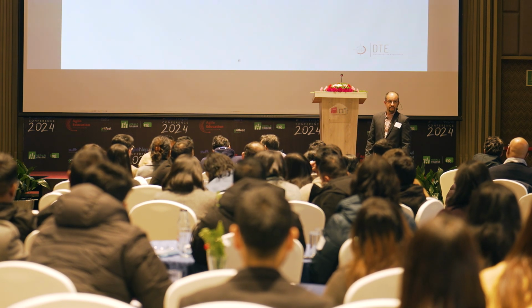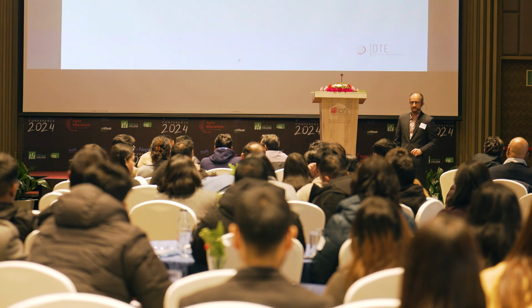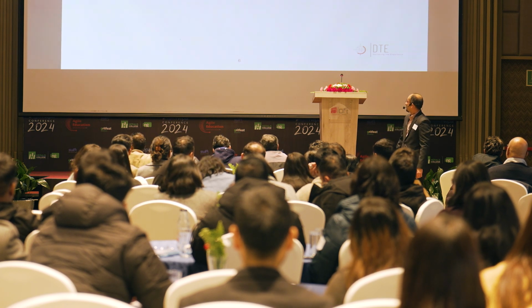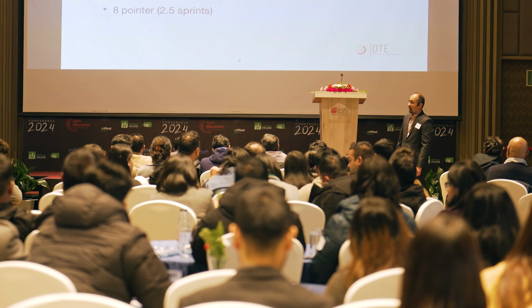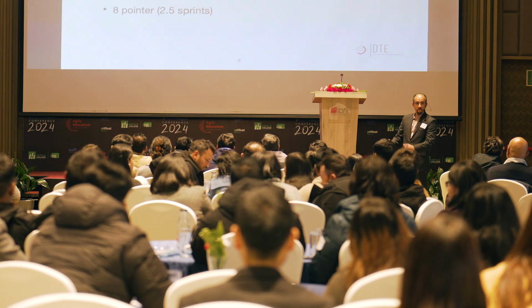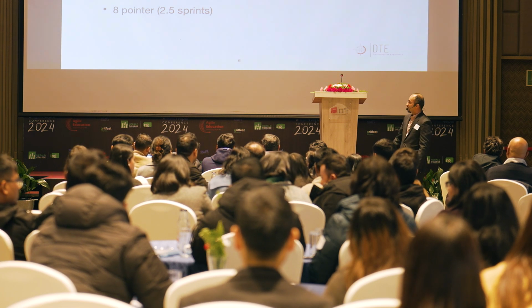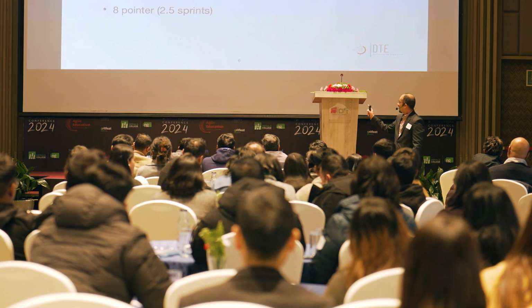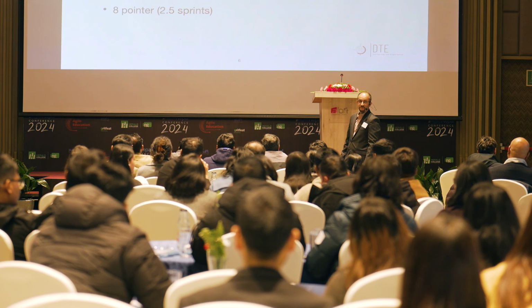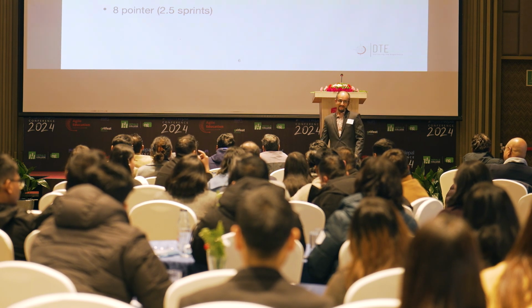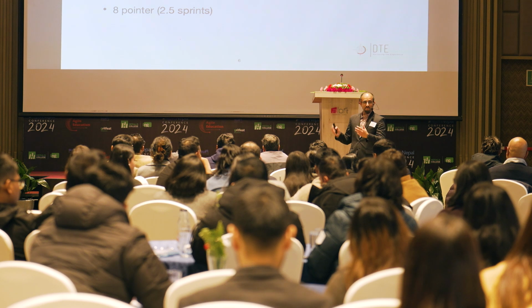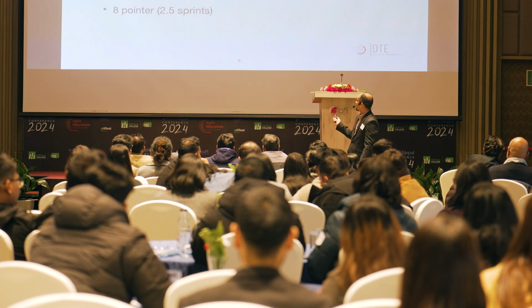Story completion rate. This is going to be awesome. It's going to blow your mind. Over the course of 1 PI, a 5-story pointer was being completed in 1.9 sprints. An 8-story pointer was being completed in 2.5 sprints. This team is a perpetual carryover team. Quantitative symptoms.